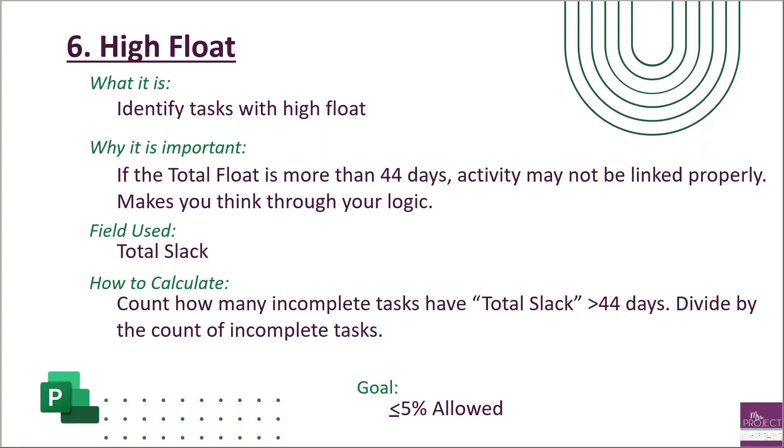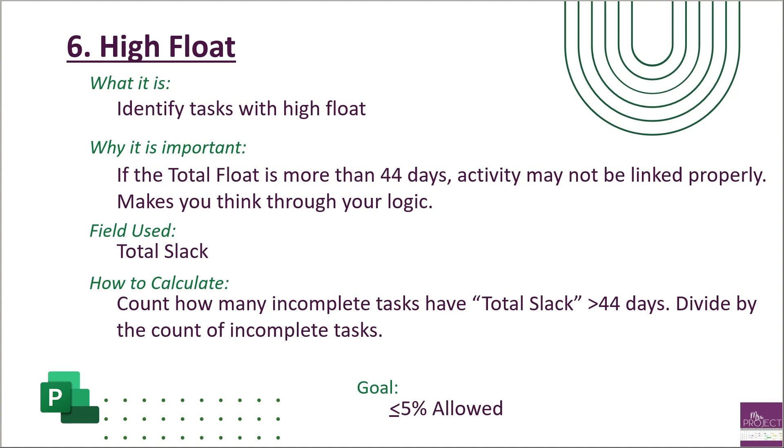So a recap of this metric: you're looking for tasks that have high float. You're gonna be looking at your total slack column, and anything that is greater than 44 days, you need to go back and look at the relationships and how they're connected. What is that logic? Try to make sure that there's nothing else that those tasks could be really dependent on, because when you start narrowing down that total float, you're gonna have better relationships in your task and then you can see the effects in your what-if drills that you're creating. Just make sure that no more than 5% of your tasks have high float. You're allowed to have some. Sometimes that's the only thing that it's linked to and that's okay, but just make sure it's not your entire schedule and it's only 5%.